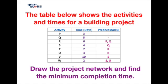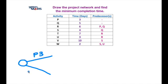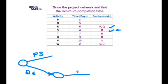Let's look at a slightly larger example. We've got activities P and Q which have no predecessors, so they'll form the start of our project network. We draw a starting node, then P coming off the top for three days and Q coming off the bottom for five days. Activity R has predecessors P and Q, but activity S only has predecessor Q. So for activity S, we place a node at the end of Q and draw S coming off that — activity S requires four days.